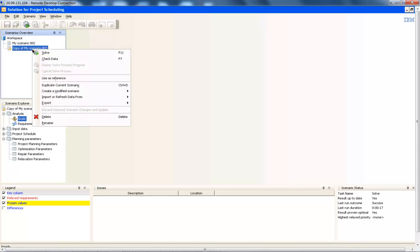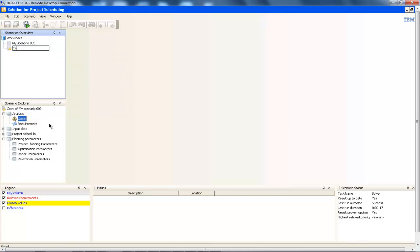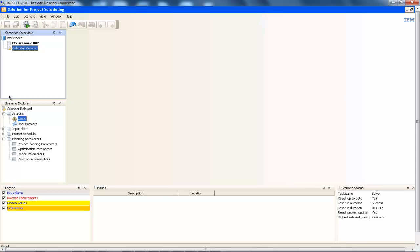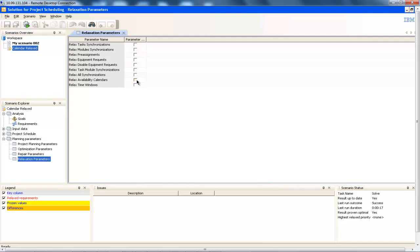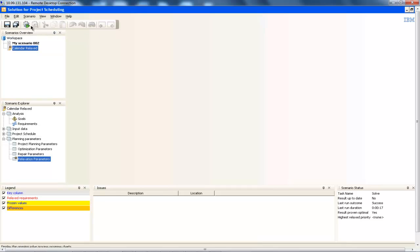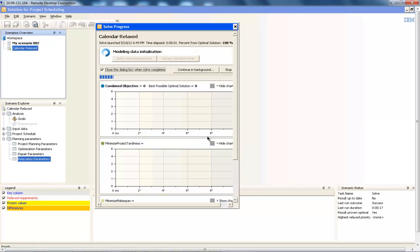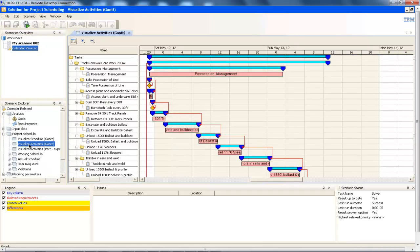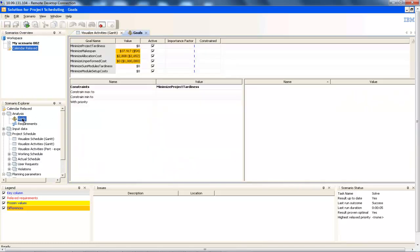To do this, we will duplicate the current scenario and rename it to 'calendar relaxed' to give it a meaningful name. We will then make the initial scenario a reference and check the differences box to enable tracking of the changes. We can now go to the newly created scenario, open the relaxation parameters section, check the relax availability calendars box, and re-solve for this scenario. Visualising the solution, we can observe that all tasks, including the possession management, have been scheduled and there is now no delay between tasks as we previously had. We can again observe these results by looking at the goals section — the penalty on unperformed tasks is now at zero as expected and the makespan has reduced to 38 hours.